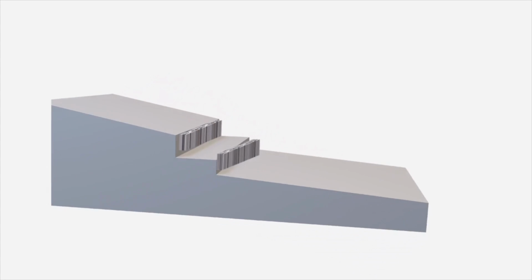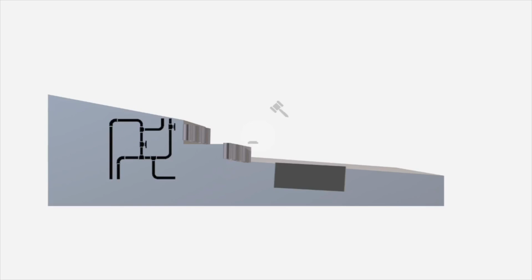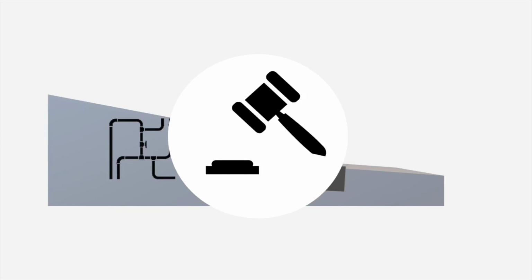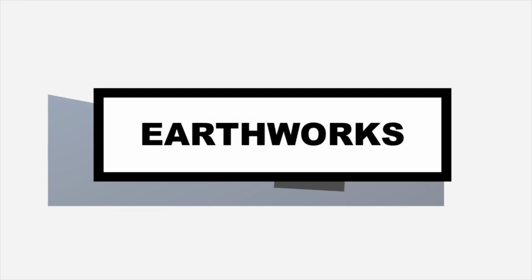Similarly, excavation for the pool will also occur according to the specifications. After that, drainage will be provided behind the retaining walls and installed so surface water is diverted away from the building to a legal point of stormwater discharge to avoid damage or nuisance to any adjoining property. Thus, MBSA will then have the very first inspection of earthworks to give their approval.